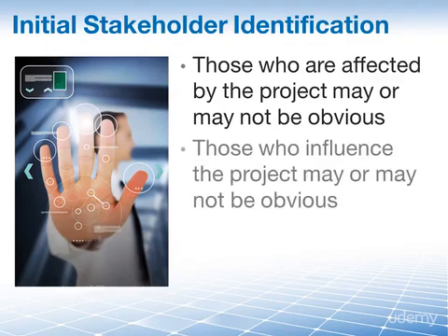In addition, there may be different stakeholders who will influence a project, some who may be immediately apparent and others who may not. Building on the bridge construction example, city and local governments will certainly have specific standards that need to be followed, but the impact on the environment might also need to be evaluated by an environmental protection agency.